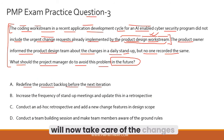Option B — increase the frequency of daily stand-up meetings and update this in a retrospective — is pointless. Daily stand-ups happen once a day; having them twice or three times is unproductive and defeats the purpose. The entire intent of a daily stand-up is to review the last 24 hours and plan for the next 24 hours. Just including the term 'retrospective' does not make this option correct.